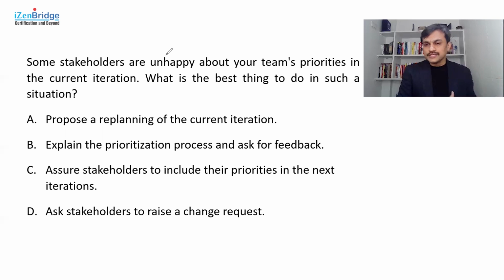Ask stakeholders to raise a change request. In the agile way of working, the current iteration gives you a hint of the agile way of working, focusing on requirements that are expected to emerge and be reprioritized; raising a change request is not needed. Sometimes some of you may start thinking, oh, if you want something to change in a current iteration, probably I need a change request. For requirement-related things, we have a backlog refinement process and we don't need a change request for that work. We may need a change request for some other purposes, which we can identify as per our change management plan, but not for our backlog prioritization thing.